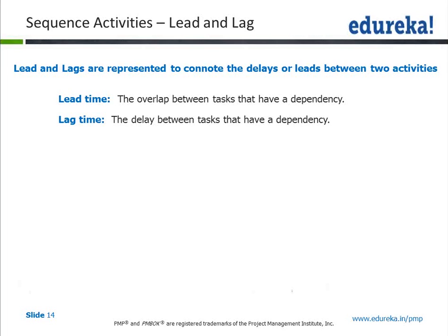That is only when requirements document preparation is complete, then you start your design. However, in practical life, that is not how it is. What we do is we say that, okay, after 1 week of requirements being done, start your designing process. So what we are doing is we are giving a 1 week of lead time. So that is a lead time.